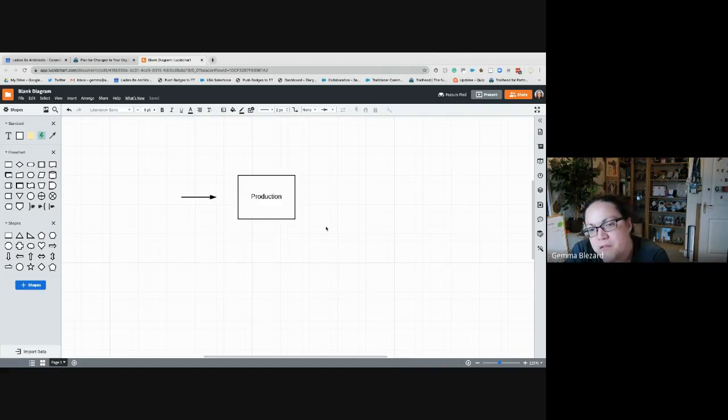Once you're live and you've got users in that production org, a general rule of thumb is you should not be changing anything to do with configuration in there. You could change list views and reports. You could change data. You might change a user and put them onto a different profile or a different role, but you should not be doing any major changes in Salesforce in a production environment when users are in there. And if I find out you do, I will find you and kick you.